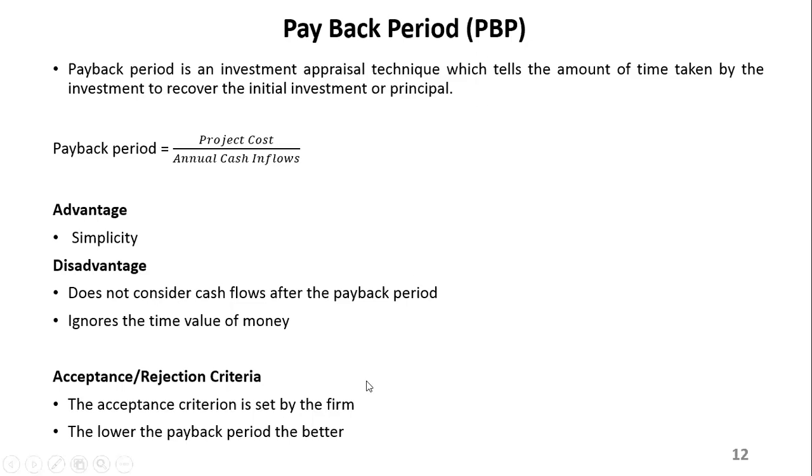But it depends also. Remember, it does not consider the amount of money invested in that project, because it's just a ratio. It's only considering time. Let's say you have invested 1 million in one project, and it has a payback period of 5 years, while in the other project you have invested 10,000, and it has a payback period of 1 year. In the long run, if you were to succeed with the other project, you will win more. So it doesn't consider such things also.